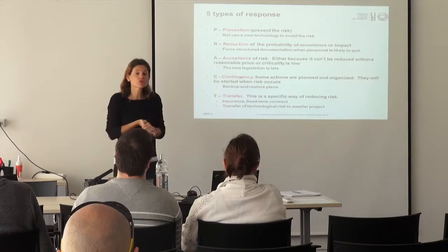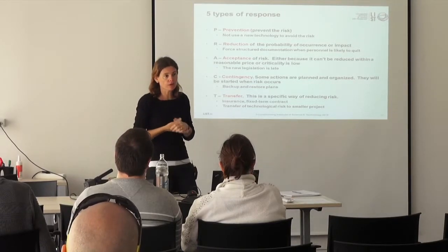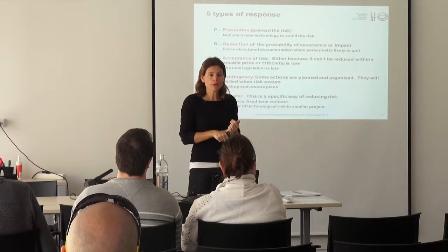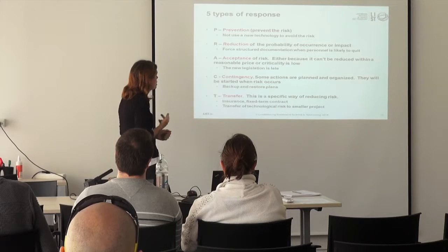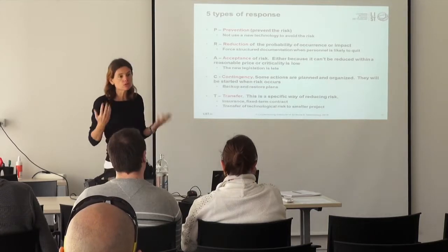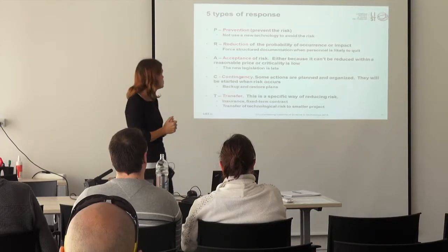You can have some reduction actions. In that case, what you try to do is reduce either or both the impact and the probability of occurrence of the risk. So most of the time the actions that you can find are reduction actions.